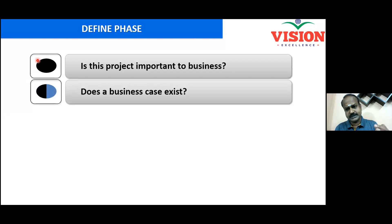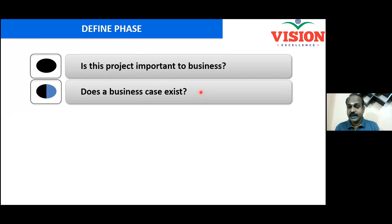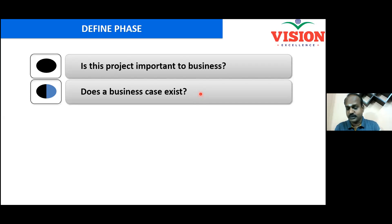Does a business case exist? You expect resources to be provided — let's say 25 lakhs is required to run your project for the next six months. If I invest 25 lakhs, what is in it for me? That is called the business case. If you can say, 'Sir, you will get 40 lakhs saving every quarter — 1.6 crore saving every year, recurring saving, and the investment required is 25 lakhs' — then a business case exists and the chance of getting approved will be higher.